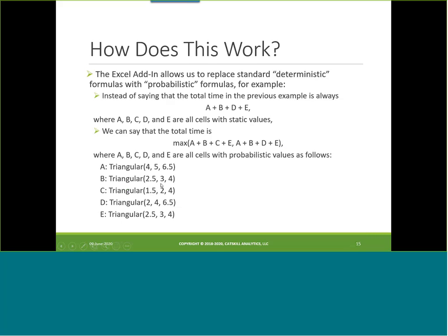These were actually the values I used. You can see on a triangular distribution, it's defined by 3 values: the left endpoint, the high point, and the right endpoint. And so you can see that in every case here, I've got the midpoint just left of center. In other words, there's a little more space between the first 2 points and the second and third point.